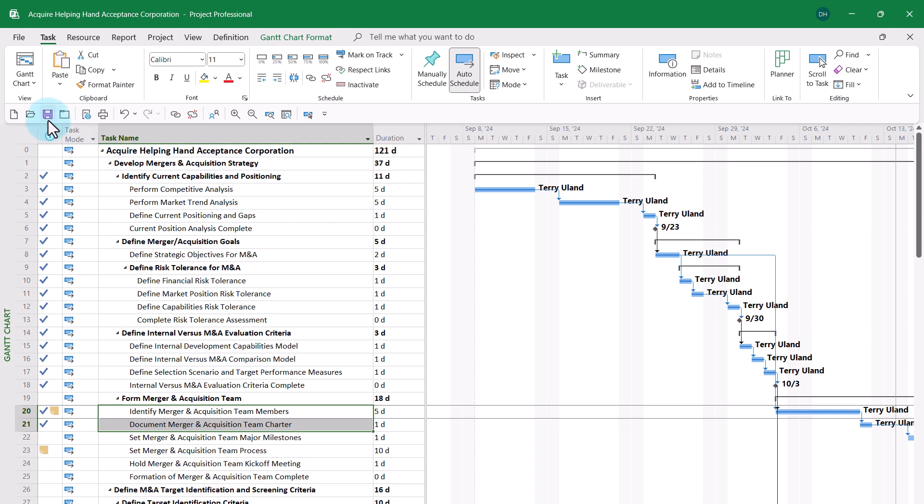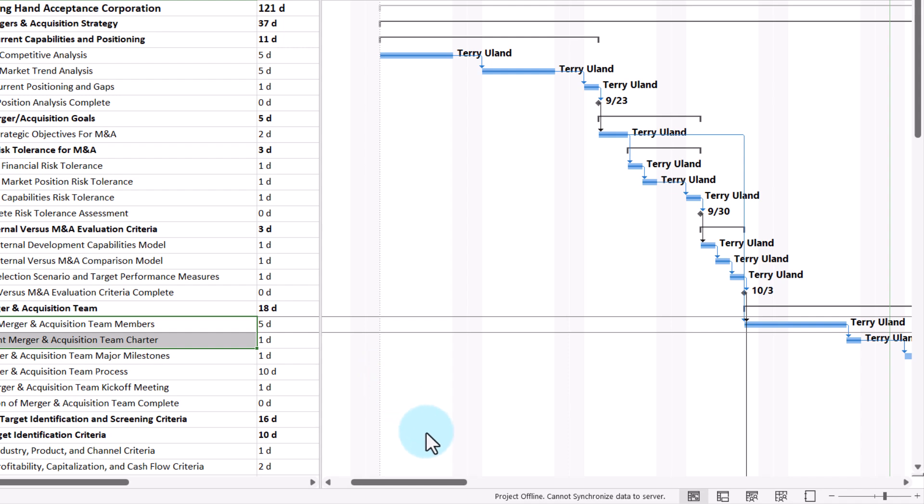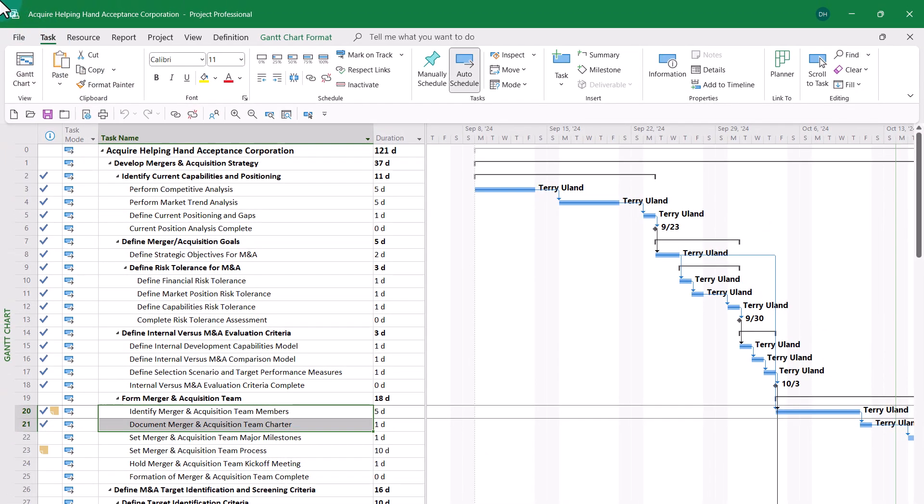I can also save the changes to the project, but in the lower right corner of the screen, I see an unusual message: Project Offline cannot synchronize data to server. What that means is that the changes I just saved are saved in the local project cache on my computer hard drive, but they have not been uploaded to the server in Project Online or Microsoft Project Server.